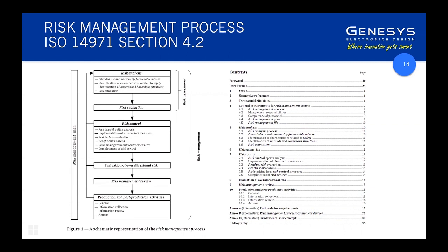And before that, you obviously have to do the planning. So before you start design controls, you have to do all the plans for that design control process. One of the mandatory plans is your risk management plan. And it's really difficult to create a risk management plan out of the air. You really have to have knowledge of some of the processes that you're going to be following before you can actually plan them properly. So that really brings it back right early into the early stage project planning.